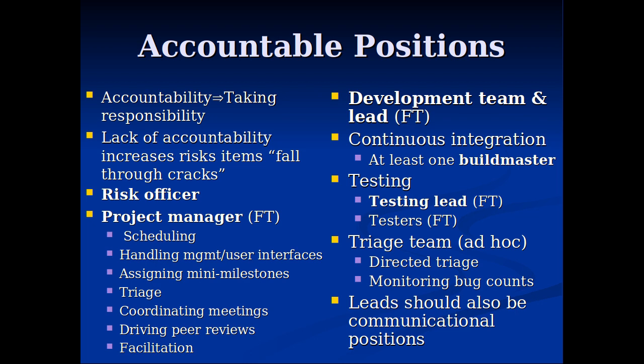Well, often, not for this class, but often the project manager will be in charge also of financial issues. So if their project's going to make a commitment to develop a feature, typically it has financial implications. And the project manager is the one who would solicit understanding how much work this is going to take and tell that to the client. Meanwhile, the developers don't want to be burdened with that. They don't know how much this is going to cost. They can't be the one making that decision. It's a project management decision, which requires consulting with often a set of different people. It requires knowing, after we deliver for this client, what's next? Who else do we have to deliver for?